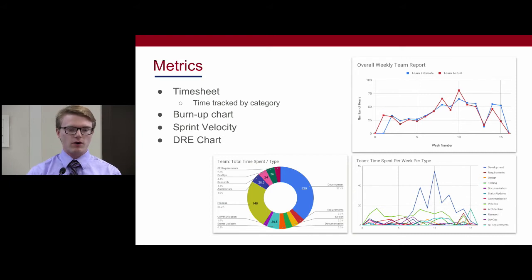Those are collected for us through our Atlassian suite and our Jira boards, using our story point estimates and our poker planning for user stories. We can estimate how much work we can get done in our 2 week span, and we can plan not only our 2 week sprint, but then using all of that data, we expand out through our epic planning, and we can estimate how long each epic is going to take. And we have our full year plan off of that.